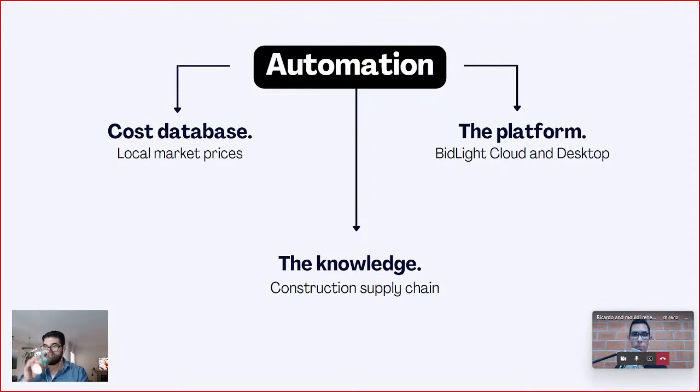Getting local market prices, getting a resource for you to update accordingly whenever this inflates because of inflation, the economy changes. You need to be able to update that dynamically, so all of your system is up to date. That's right. You and the system, because you actually input that info, and the system recognizes it and updates the whole estimation that you already have in place.